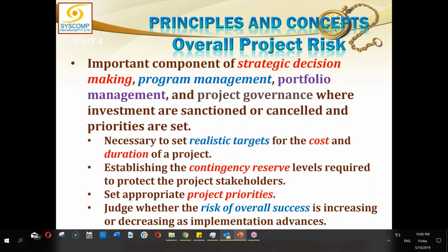A project which is running and suddenly becomes very risky can even be cancelled, or it could be reprioritized. The portfolio could reprioritize your projects, and ultimately the project you were doing, which was at top priority in the beginning, now lies much lower, and you do not get resources as desired just because it is not the priority of the organization. And maybe someday your project gets cancelled just because of its risk profile.